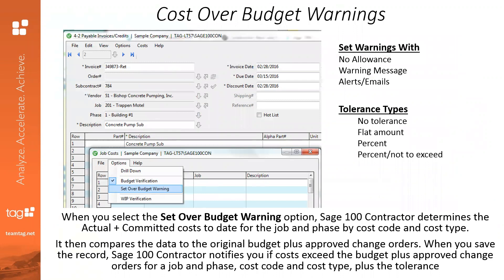Let's talk about cost over budget warnings. Sage 100 Contractor tracks all costs against the prime contracts, budget, and subcontracts. When an invoice comes in, the software will automatically warn if it's not for something in the contract, and it also raises a red flag if costs exceed what's outlined. These red flags can be either a soft warning or they can completely stop you from proceeding — that's totally up to you. You also have tolerance types: a percentage or a flat dollar amount, making it very customizable.